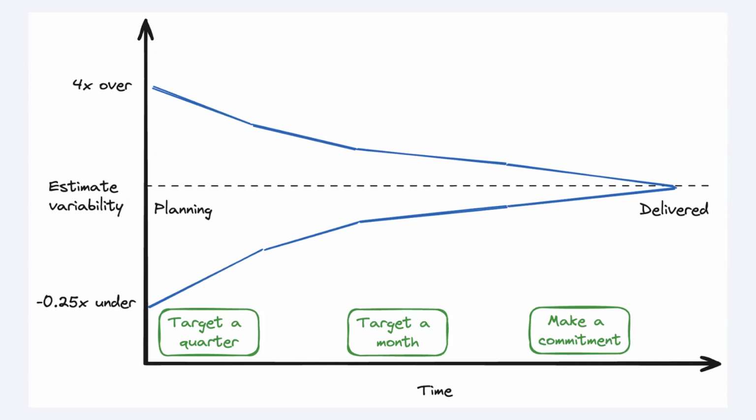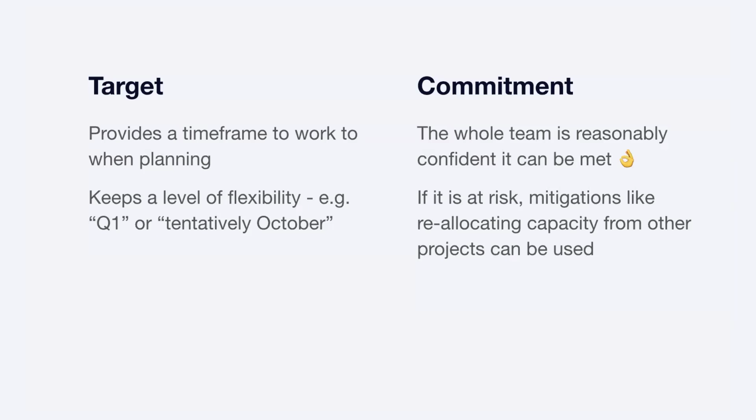What tends to happen though is that there's a stalemate and both sides are kind of refusing to come to the middle like that. And I think that's one of the biggest things that unseats trust between technical teams, product teams, and the business, and so on. So I'd really encourage anyone to try and get this point across and work towards it. I think of it really clearly as there are targets and there are commitments. They are 2 different things.